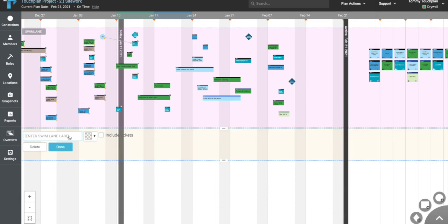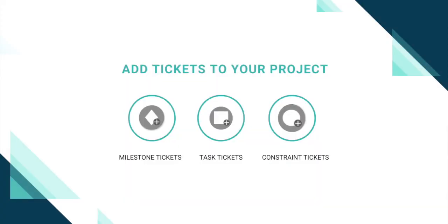Swim lanes are typically utilized on construction projects by locations. So within a phase plan, you would have swim lanes for Area 1, Area 2, and so on.